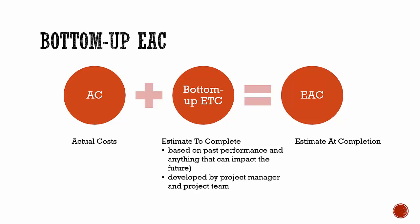Forecasting the EAC involves making projections of conditions and events in the project's future based on current performance information and other knowledge available at the time of the forecast. The work performance information covers the project's past performance and any information that could impact the project in the future. EACs are typically based on the actual costs incurred for the work completed plus an Estimate to Complete of the remaining work.